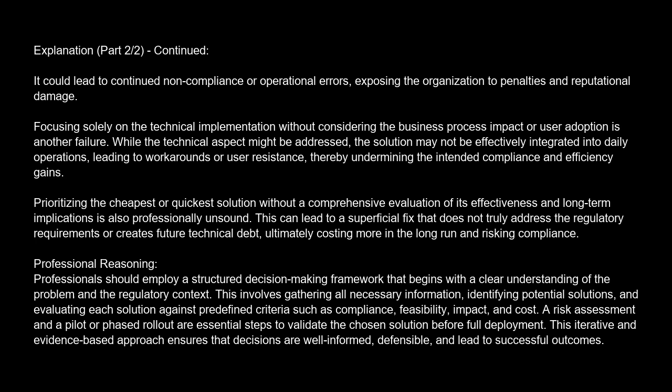This involves gathering all necessary information, identifying potential solutions, and evaluating each solution against predefined criteria such as compliance, feasibility, impact, and cost. A risk assessment and a pilot or phased rollout are essential steps to validate the chosen solution before full deployment. This iterative and evidence-based approach ensures that decisions are well-informed, defensible, and lead to successful outcomes.